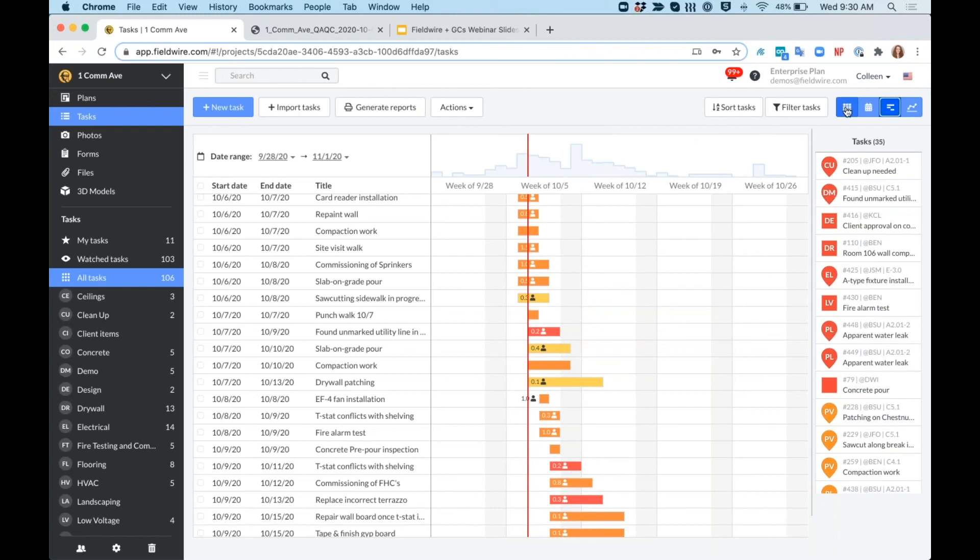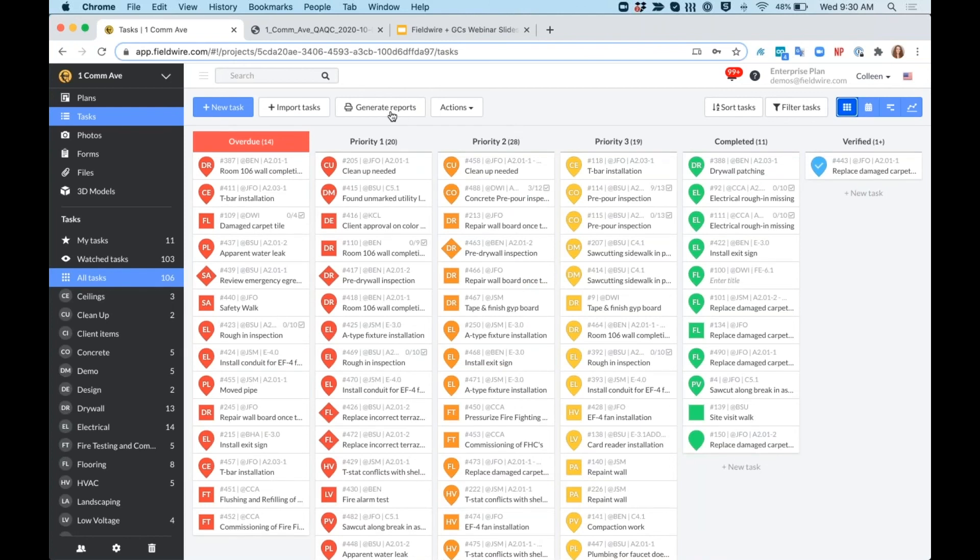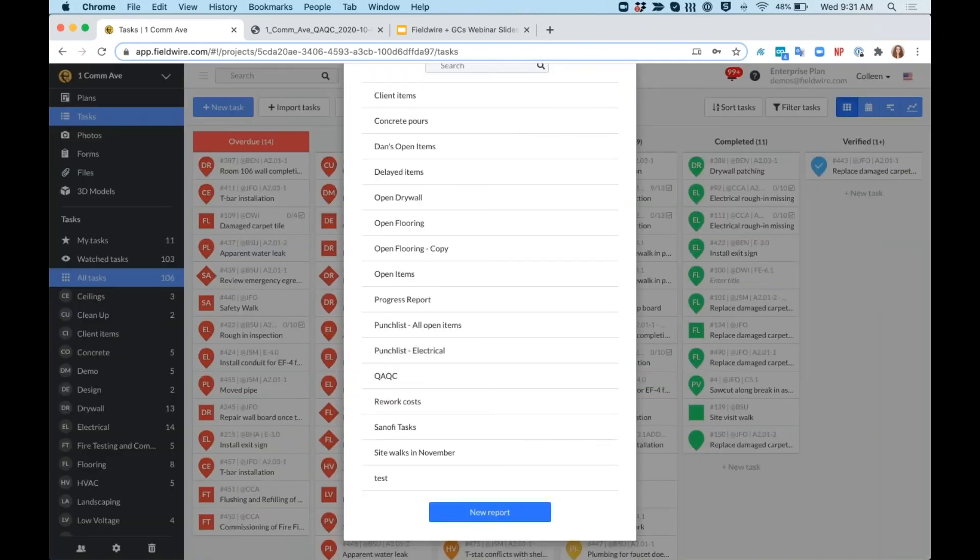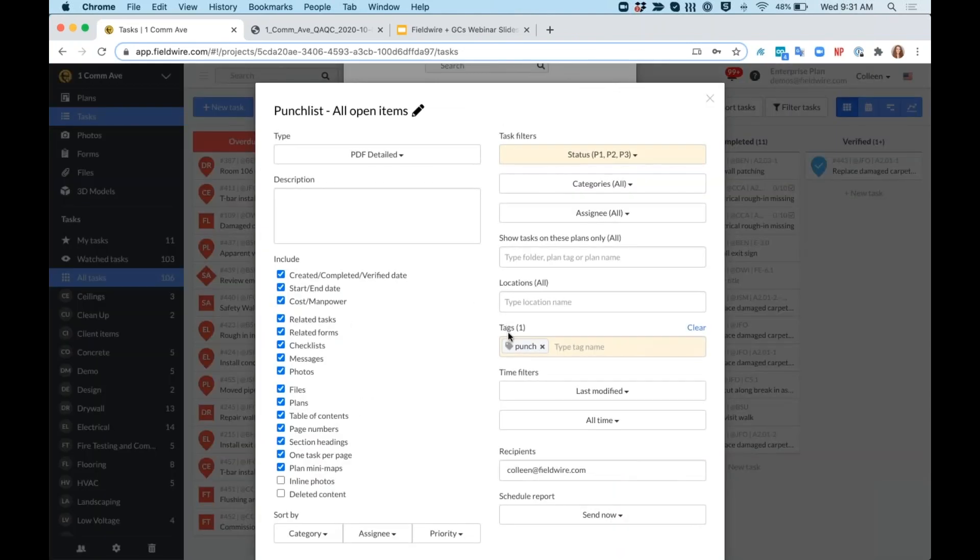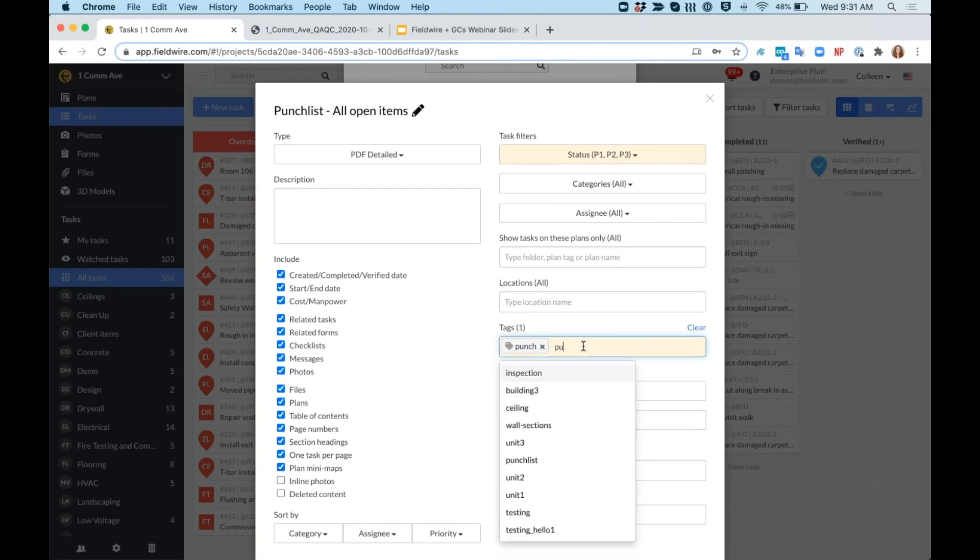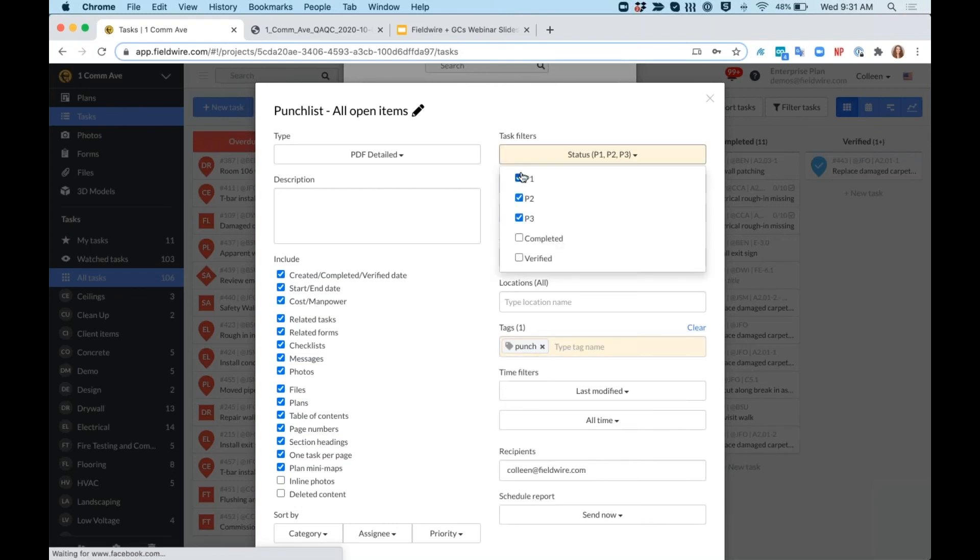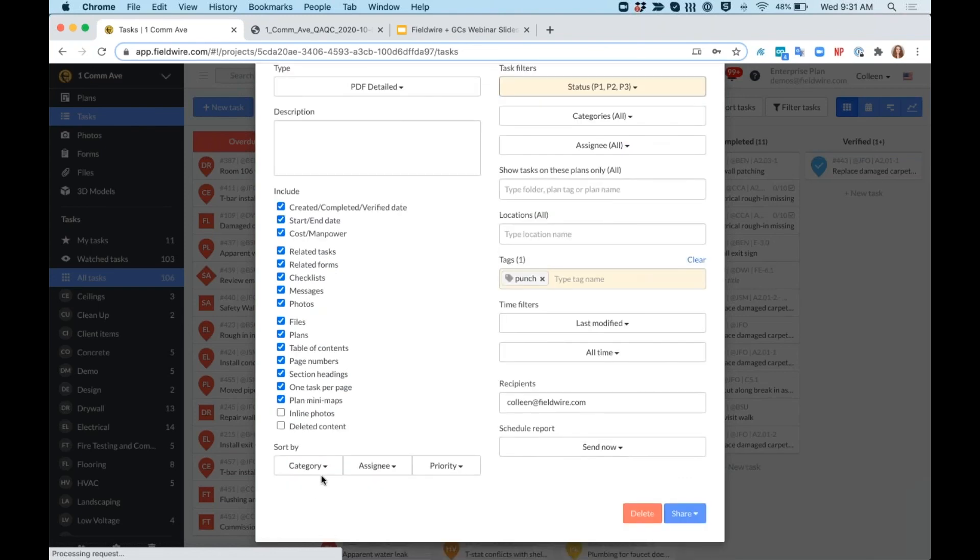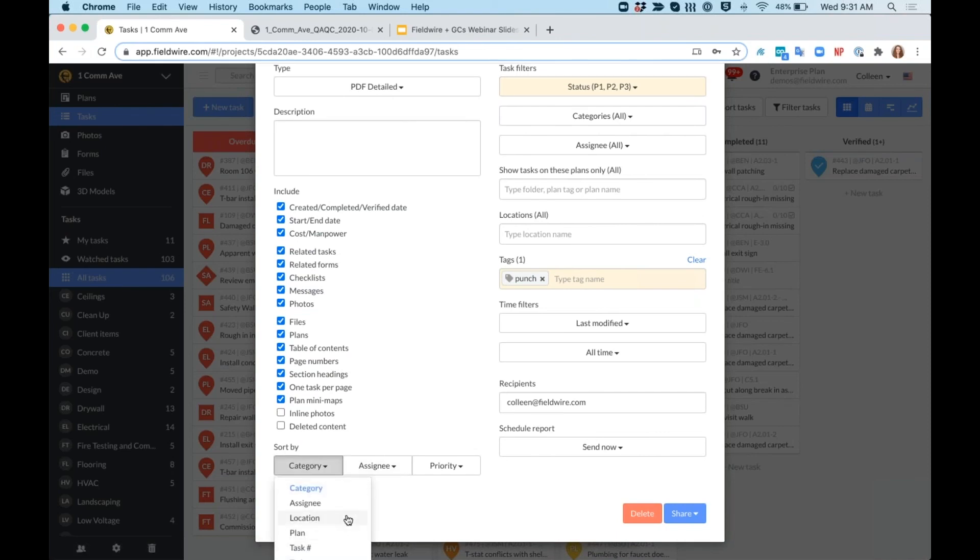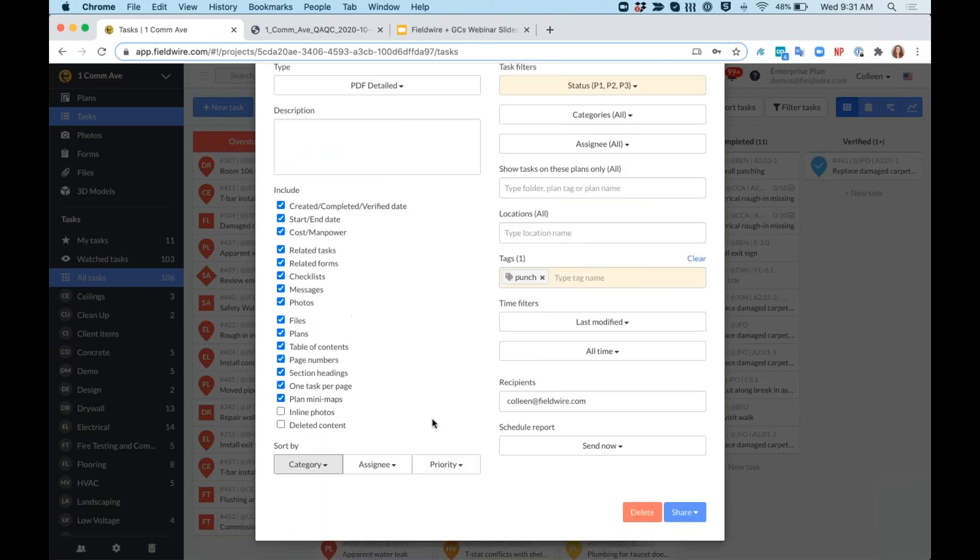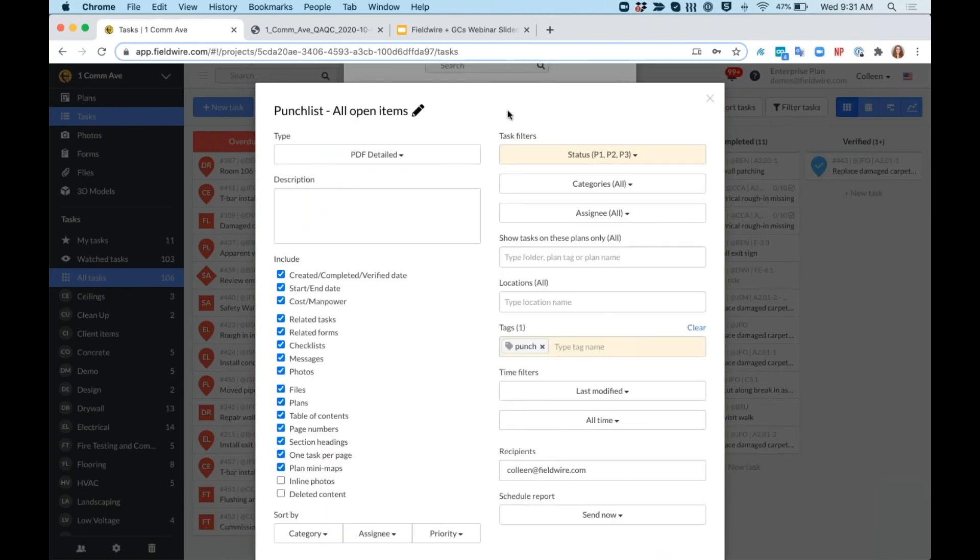When we want to report on this punch walk specifically, again, we'll come to generate reports, create a new report, or use our all open items punch list report. You can see I've just used the punch tag here, but I could also filter down to my punch 10-7. Let's just keep it at punch for now. I've only done my open items, so just priorities one, two, and three, not those that are completed or verified. I can sort by specific categories or locations, start and end dates, hashtags, and more. And then let's take a look at what this report looks like.